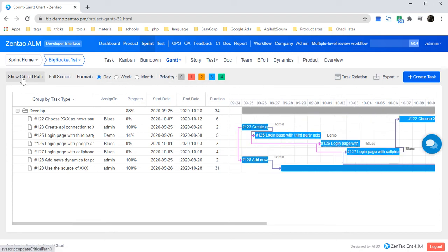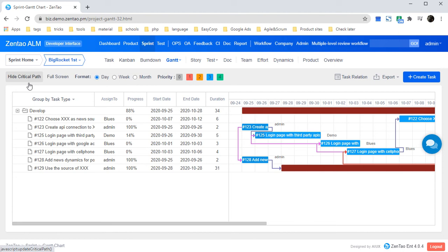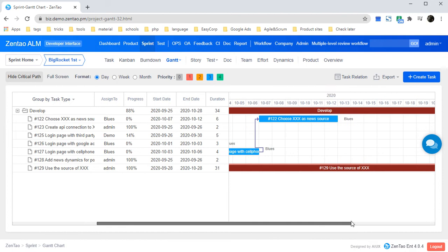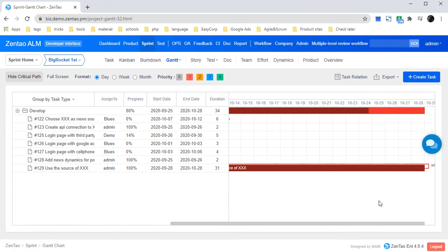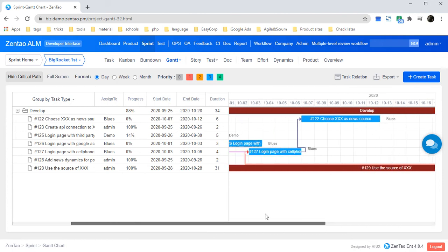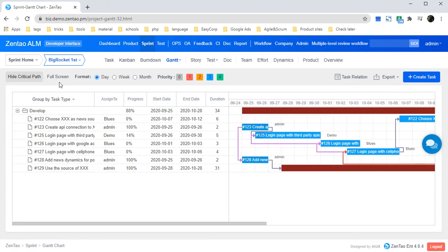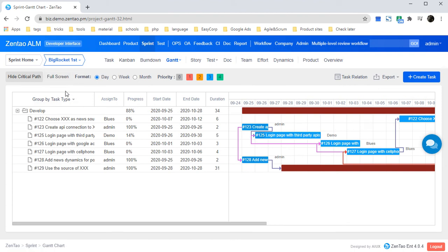If you click show critical path, it will show all the tasks which could delay the whole sprint if they get delayed or suspended. You could also click full screen to check the graph in a very big view.